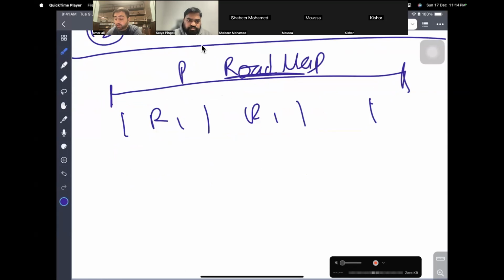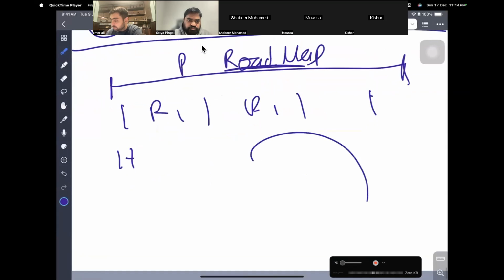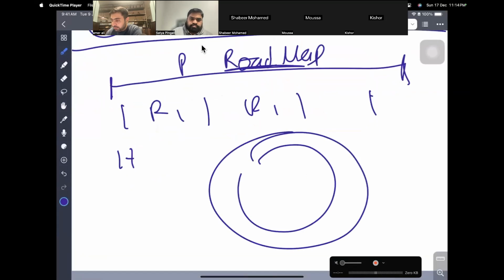The length of an iteration is 1 to 4 weeks. And then we have daily stand-up. It can also be put in this way: we have the roadmap, then we have releases, then we have iteration or sprint, which is 1 to 4 weeks, then we have daily stand-up, which means as we move forward, we plan in more detail. This is the high level of agile.